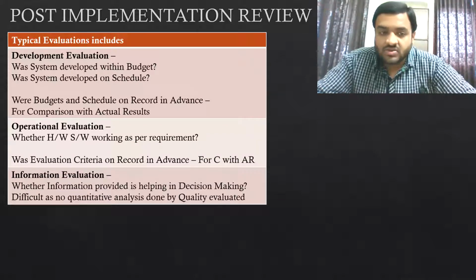But to compare it with the budget and schedule, we need to provide the budget and schedule before we start developing it, so that we can compare it with the actual results. So we will also see whether it was on record in advance. So in development evaluation, we will see only whether it was developed within budget and on schedule.